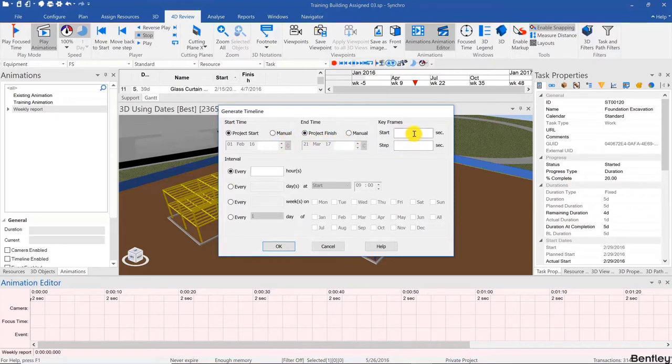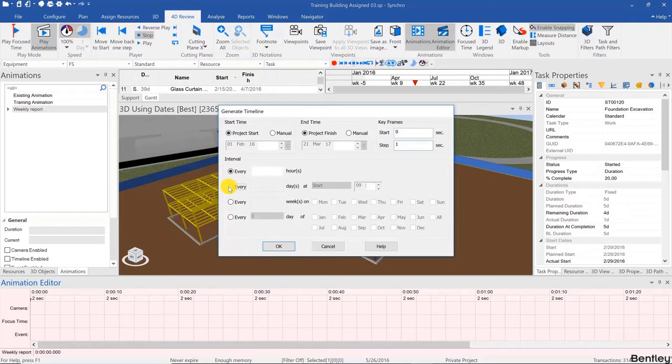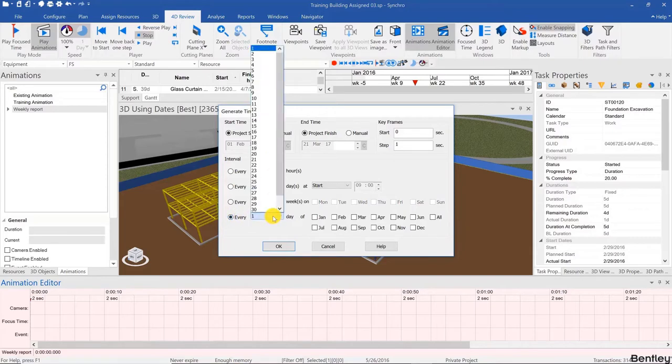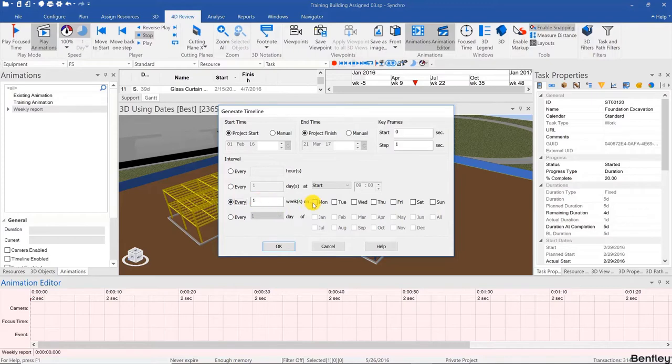Here we can say start at zero and step one second, so it's incrementing one second between each keyframe. Each keyframe is in project time captured at every one day for a daily report, or every one week for a weekly report, or every one month for a monthly report. Here we're going to do every one week on the Monday, and we'll click OK.